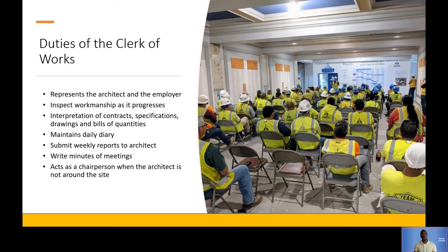Okay, and then he submits weekly reports. So he makes sure that as he writes the daily diary information, at the end of the week, he compiles all of that into a weekly report and then sends it to the architect to brief him.